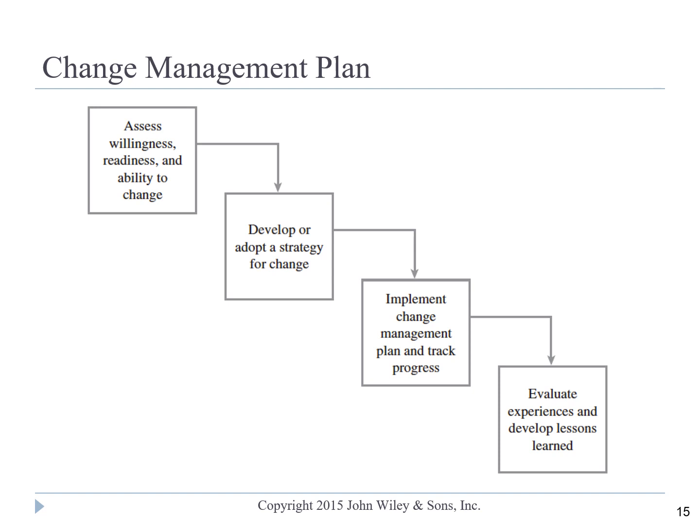You implement the change management plan, and you keep track of the progress. Again, just like many other plans that we do, we develop the plan, we implement and track it, and finally we evaluate the plan, its results, and develop lessons learned, so that in the future our change management plan could benefit from our experience.